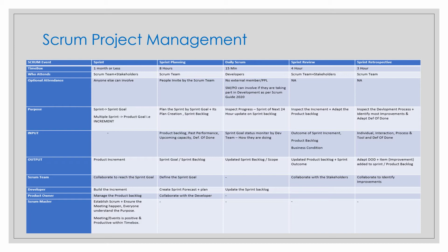Based on my objective, I will choose this. So the definition of done represents the commitment for the increment. As soon as one product backlog item is completed and meets the definition of done, a new increment is created. So the DoD also checks, and it is transparent for everyone, whether it has the non-functional and functional requirements as a part of the definition of done.